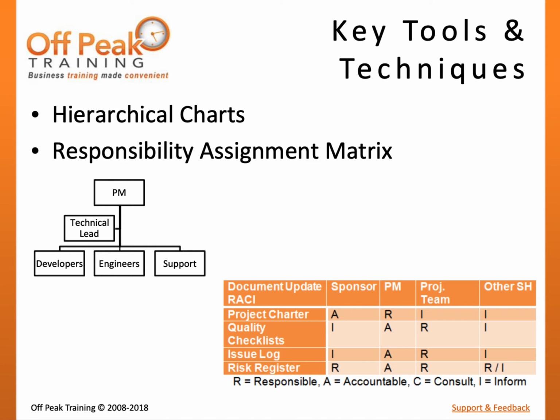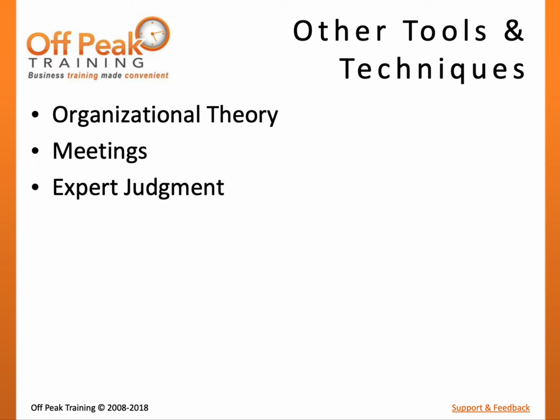Do not confuse the RACI Matrix with the project activities. Activities are scheduled for one date to another in time management. The RACI Matrix shows duties that team members may be responsible for throughout the project lifecycle, such as maintaining meeting notes. Other tools and techniques include organizational theory, the body of knowledge on how people and organizations act.